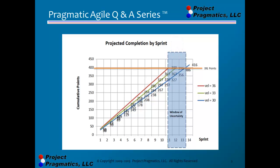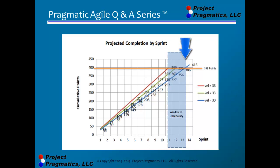Now let's say the team speeds up — add a 10% bonus to their speed — and they'll have a velocity of 36. That would be the red line, which finishes earlier at sprint 11. A team that slows down for whatever reason, say to the velocity of 30 — 10% less than their current velocity — would stretch out the project to between sprint 13 and 14.